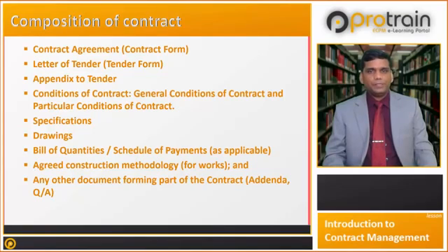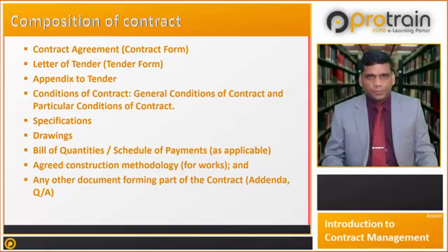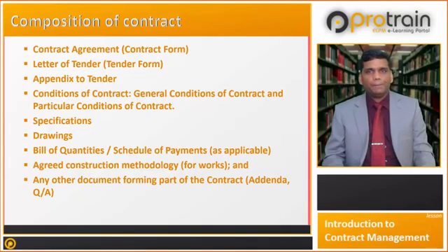Interim payments for both are made on the basis of defined percentages, milestones, or the works completed. Agreed construction methodology should be included in the contract document. Any other documents forming part of the contract, such as quality assurance plan, should also be included.